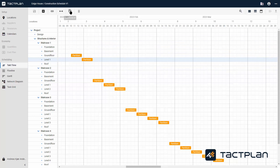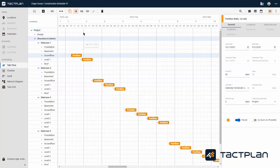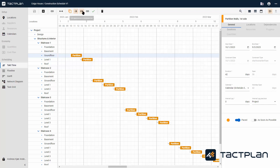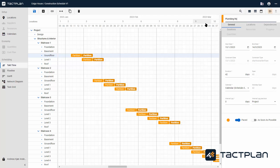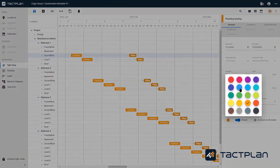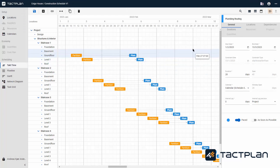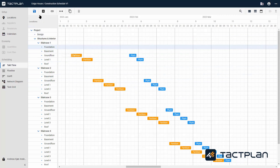Now we will show how to copy activities with the same settings across multiple locations. The next task we want to create has the same location as this one, Partition Walls First Site. In that case you can click Duplicate Mode, then you can decide where the task should be placed in relation to the one you are duplicating. You can also decide if it should have dependencies for the task you are duplicating or the same dependencies as the one you are duplicating. Once selected, click Duplicate Task and there comes a task just like it. Here the name is changed to Plumbing Routing with a duration set to 28 days. Please select the color for this activity. Remember to save.